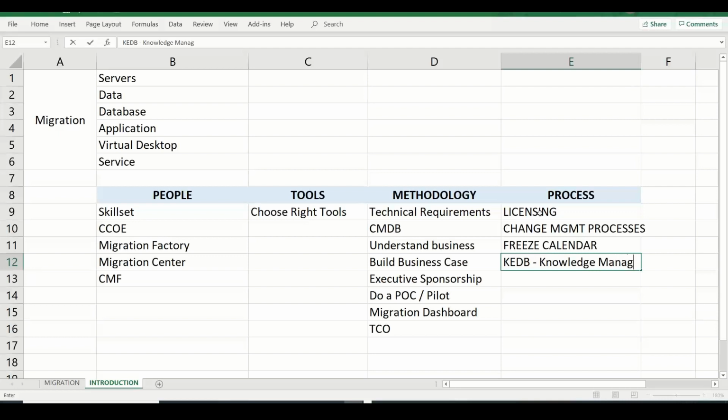Lessons learned, and issues, risks, and all those registers have to be maintained. And not just that, a lot of SOPs, like your standard operating procedures, your RAID log, risks, assumptions, issues, defects, all those things have to be captured in a centralized place. So they call it a RAID log. RAID is nothing but risk log, assumption log, and then issue log, and the defects log. So they will capture these things in a separate template.